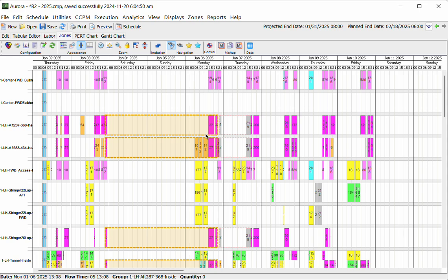Now, there are configurations you can tweak if that isn't true, but in this case, you can see that partly I'm splitting over the weekend, but I'm also driven by what shift this labor is working. Here, I actually had a few other jobs come in and get worked on shift 1, while the pink work was paused because the labor was not available.